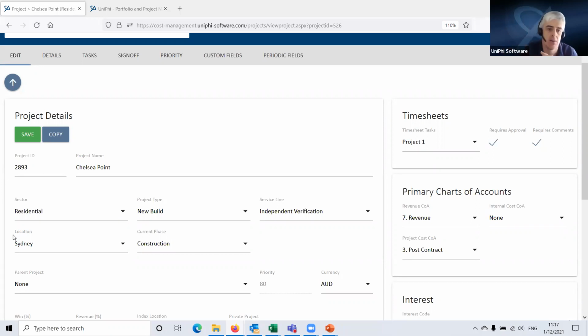And the metadata filters usually get renamed to reflect what the levels of that work breakdown structure are. So just to make one up, the location is quite often changed to be a zone. If it's a large infrastructure project, let's say it's a massive pipeline, and the project has been broken up geographically into zones, we can use that location filter to categorize each part of it as part of that zone.